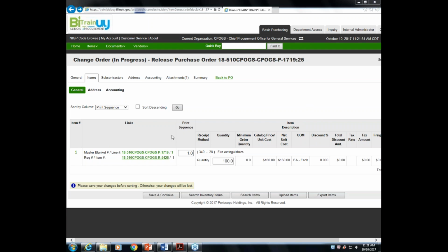And someone says, so even off of the master? And yes, at $20,000 and above with a master, the signatures are required. And that is a bit different than how IGPS operated. So with IGPS, if you were ordering off of a contract in that system, it would do the obligation for you.